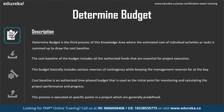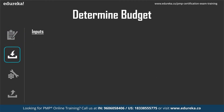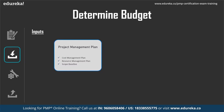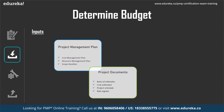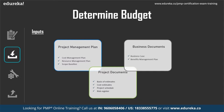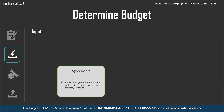The cost baseline is authorized — it is an authorized, time-phased budget used as the initial point for monitoring and calculating project performance and progress through earned value management. Inputs to determine budget include the project management plan (cost management plan, resource management plan, scope baseline), project documents (basis of estimates, cost estimates, project schedule, risk register), business documents (business case, benefits management plan), and agreements with suppliers or customers.